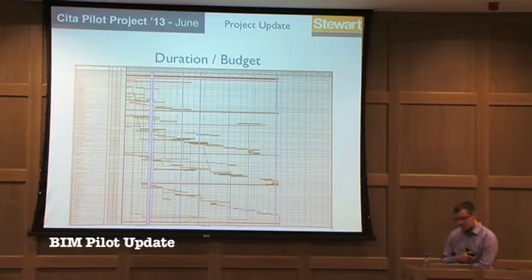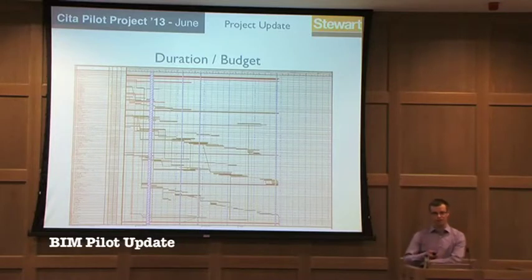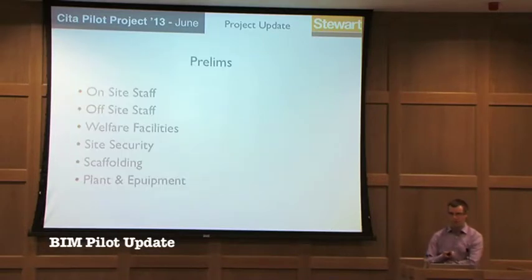And I think it's important to say that the project is assumed to be between tender stage and construction stage at the moment. And under the current government public contracts, you cannot appoint a contractor until the full design is complete. So I suppose constructability review is a feature of BIM where the contractors are involved, but you obviously can't have a constructability review when the design is complete before you appoint a contractor. So currently, the situation with the government contracts doesn't necessarily allow that to occur.